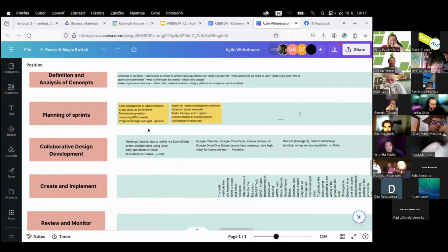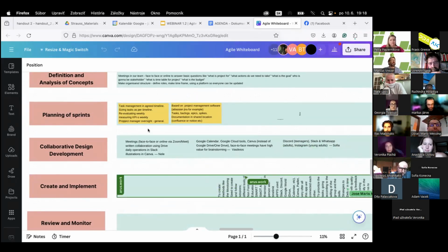Okay. So generally it's a good idea to have your fixed time frame. You scale your tasks into that time frame. If you have a task that is not defined enough to be finished in a time frame, either it has to be granulated or a spike created to figure out what exactly is needed to achieve whatever it is that needs to be achieved.